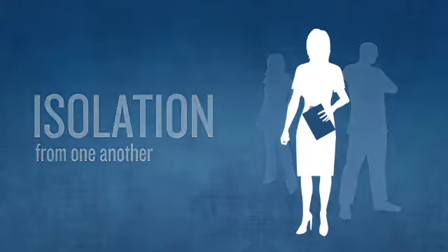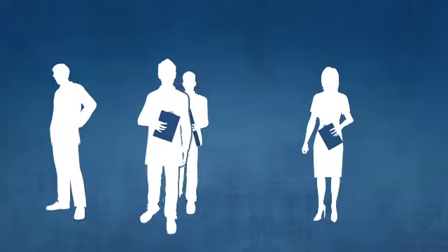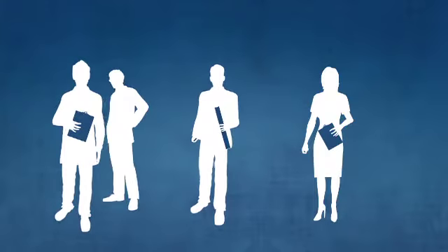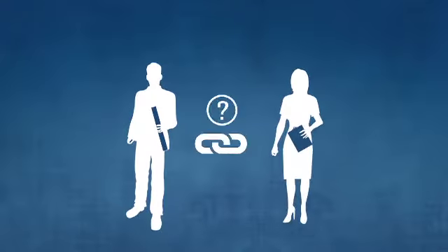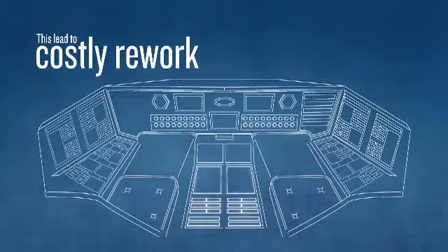In the past, it was challenging for her to find the right human factors design guidance relevant to her projects. She wasn't sure when and how to consult with a human factors specialist, so she often didn't until later in the design process when her components were evaluated in an integrated test environment. This led to costly rework.